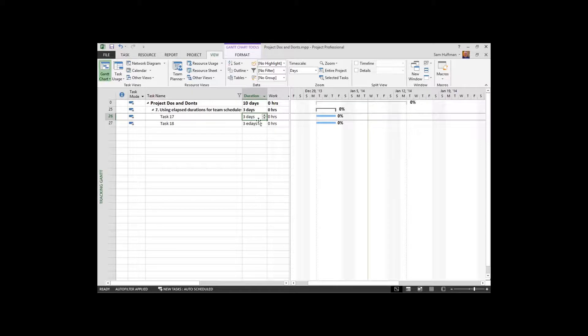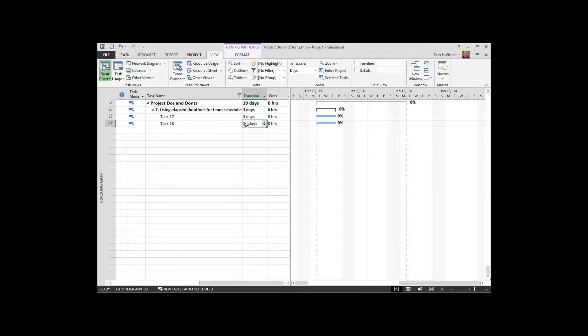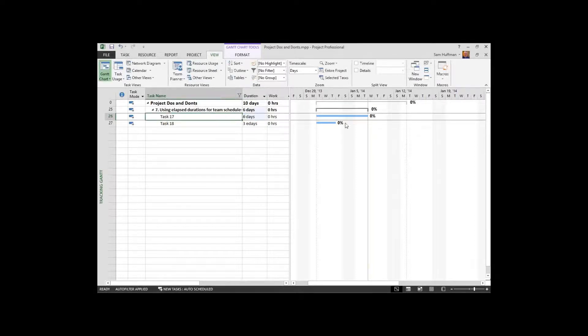Three days is a working duration. Three E days is this consecutive time that we're talking about. And if I were to tell project that a task was say six days, that means show me that week.